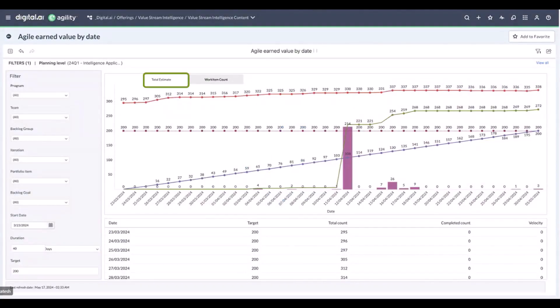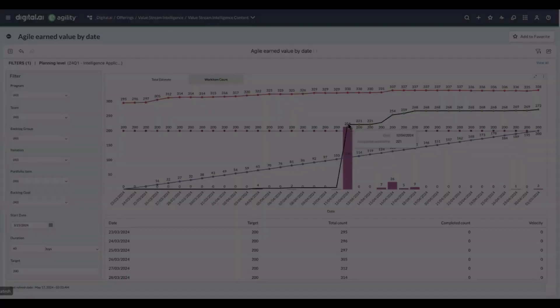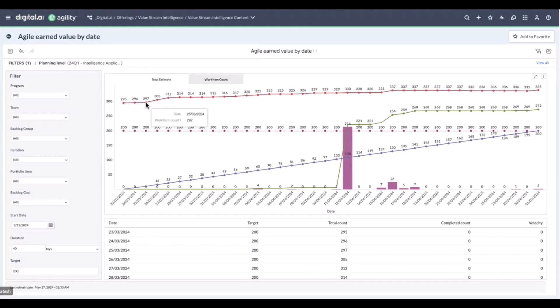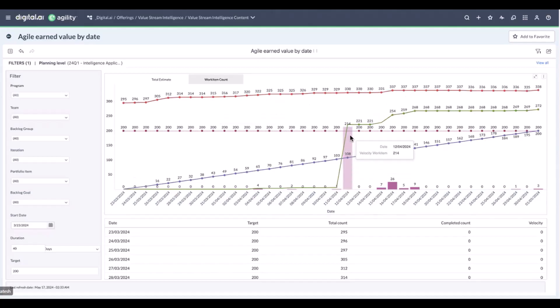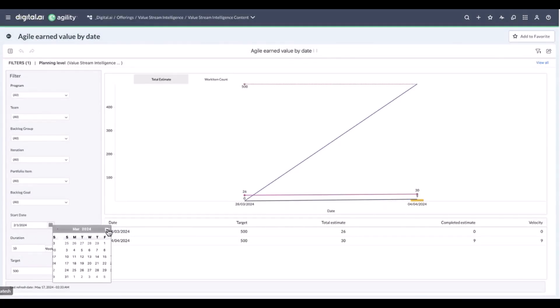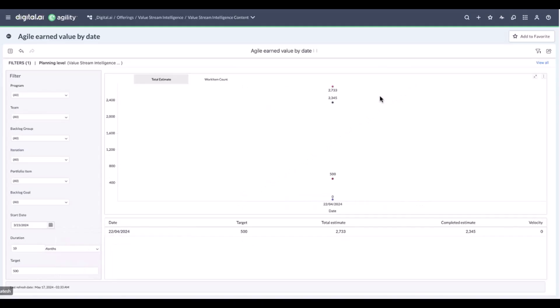This helps identify potential issues and ensure you stay on schedule and within budget. All the completed work items are highlighted here, and the ones which are created are highlighted up here. The numbers here are a cumulative count showing you how many work items are created, and this green bar lets you know how many work items have been completed. The bar is the velocity showing you how many work items are completed each day. You can view this chart by day, week, or month. Here is a weekly view of the dashboard, and then there is the monthly view. On the bottom of the dashboard, you can see how the team is doing week over week.